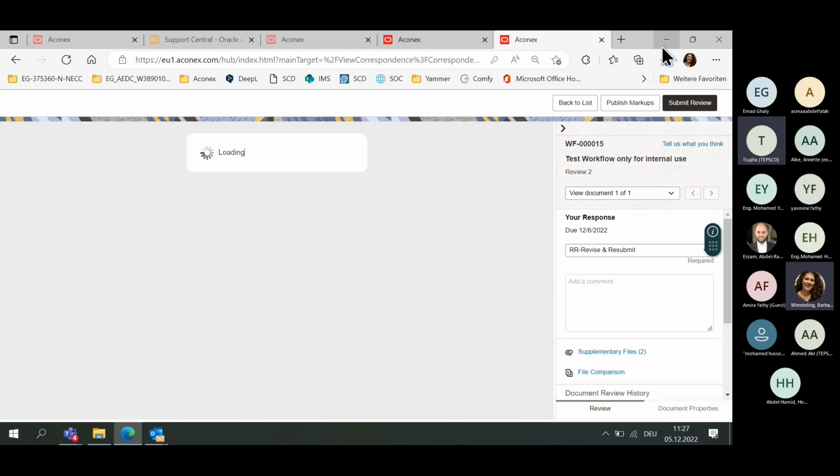And during the negotiations, it's then another number. We decided this. So this is what the customer or the engineer can see in this Excel sheet. And if we get the comments back in the Excel sheet, we can automatically upload these sheets and the comments back in this requirement management tool and create the new. For sure we can make the review in PDF also. But if we do so, then we must manually bring these in the tool, and then sometimes there could be a mistake.